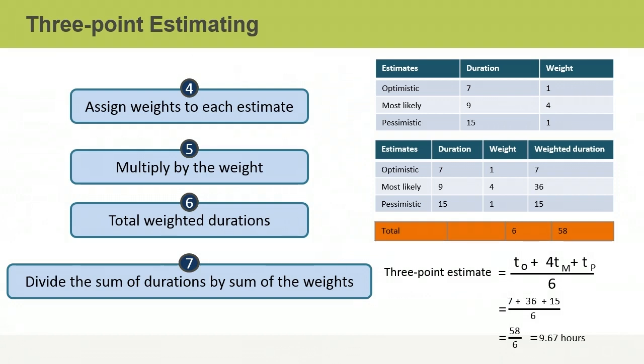In the sixth step of the process, you total the weighted duration of each estimate. In this case, the sum is 36 plus 15 plus 7. This gives you a total of 58.